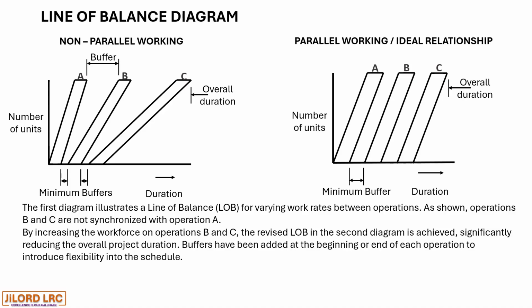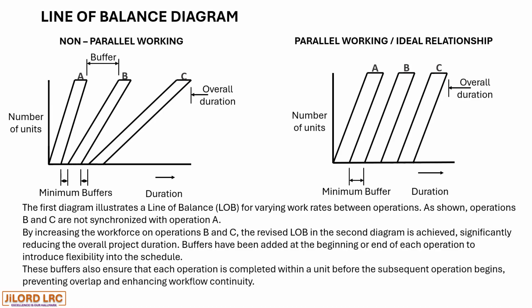Buffers have been added at the beginning or end of each operation to introduce flexibility into the schedule. These buffers also ensure that each operation is completed within a unit before the subsequent operation begins, preventing overlap and enhancing workflow continuity.